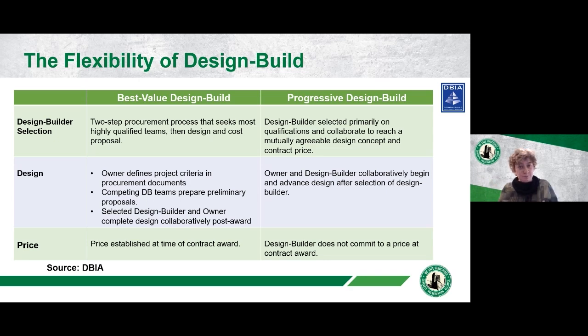In order to provide a firm fixed price on construction, a best value design build requires the design build team to put in a lot of upfront effort to move forward a best value design build. So that's why it's so important to make sure that there's that two-step approach and that there's the shortlisted approach so that you don't have an unlimited number of teams putting forth that type of effort.